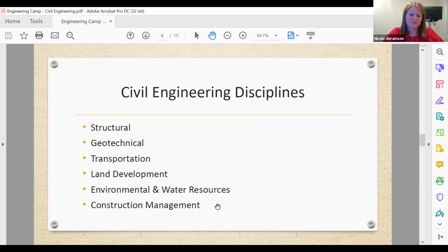Safety is definitely one of the most important parts of building a project. So there's a lot of planning that goes into it from the beginning to make sure it can be done safely. That's how the 3D model helps to figure out where we are going to have issues and how we are going to be able to build this. Gotcha. So you use that 3D model to figure out the issues before they actually become an issue. Exactly, because it's a lot easier to address in a 3D model when compared to building the bridge in real life.